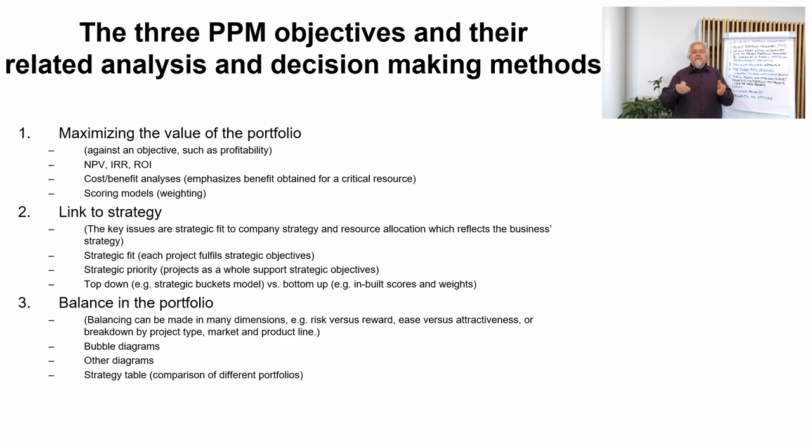Or we can have bottom-up approaches, where we already have certain projects or project ideas going on, and we evaluate them and score them, calculate the profitability and evaluate them against certain criteria, and then we make a portfolio of projects that we have selected from the bottom up, from the initial project candidates that are available, and we can select them into our portfolio.